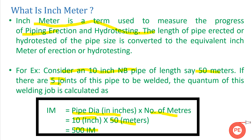There is a very minor difference between inch dia and inch meter. Whenever we talk about fabrication job in piping, we use the term inch dia. But whenever we are calculating how much erection has been done — how much pipe has been laid on pipe racks or underground — that is calculated by inch meter.